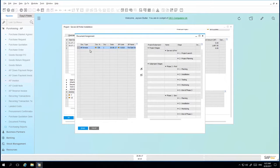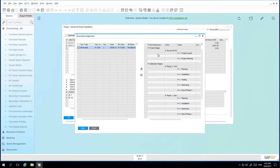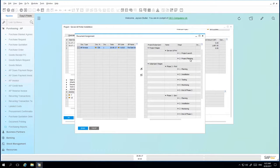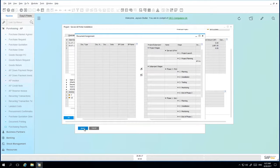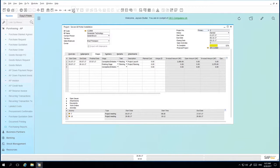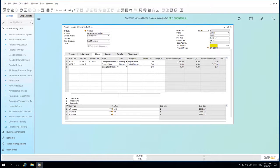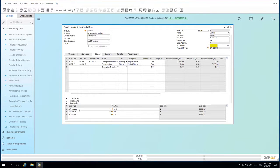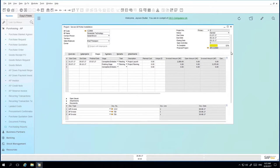And we can see under the document assignment window that the AP invoice needs to be assigned under a particular project stage. And in this case I'm going to assign it under the first project stage under project planning. If I then drill down under documents, I can then see I've got an AR invoice and actually two AP invoices that I have assigned to this particular stage of the project.